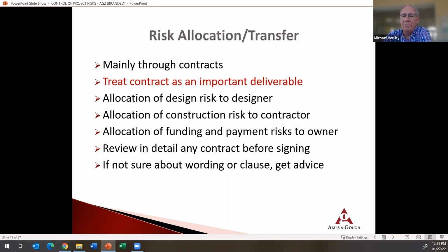This basically said that the engineering firm involved was going to be responsible for everything, any and all claims of any nature from wherever they may have come, unless they were due to the sole responsibility of the city. And this page had to be signed and dated. And the firm was sending this to me.